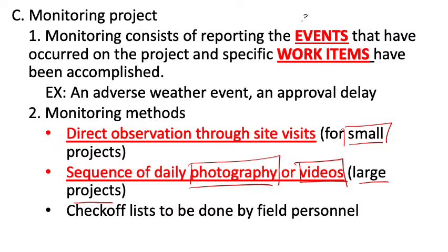You install a few video cameras around the construction site and record video, or periodically take pictures. This data will be given to a team of people, and they will watch and look at the pictures and identify the events and all the work items completed during a particular day.